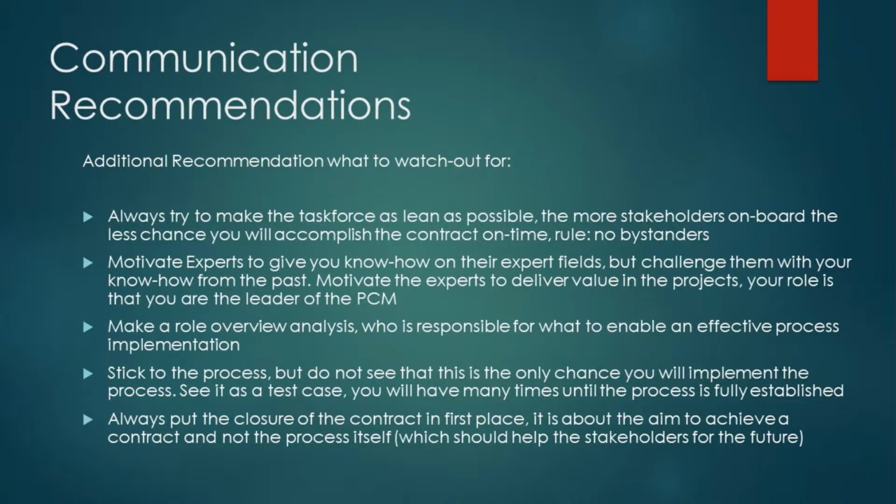Always try to make the task force as lean as possible. The more stakeholders on board, the less chance you will accomplish the contract on time. Rule: no bystanders. Stakeholders who you believe bring no value to the project should be eliminated, in the sense of not including them in the project. You should not make a big political revolt, but you should clearly state or challenge them on what they bring to the project. This is something you also have to do.